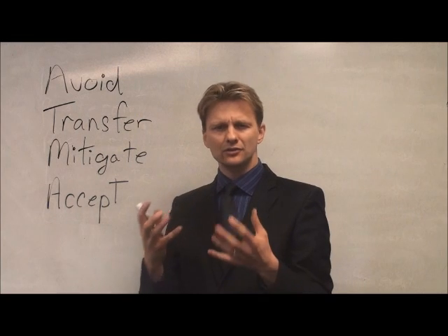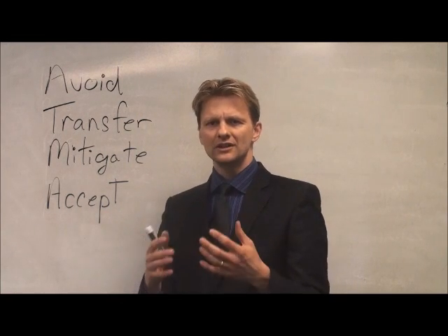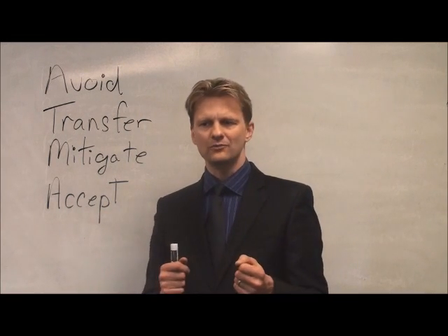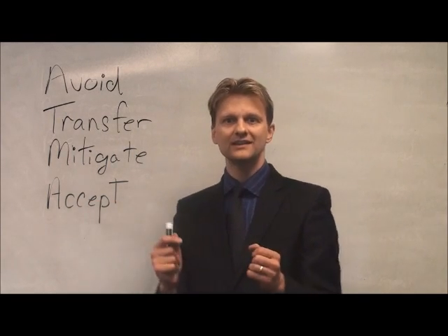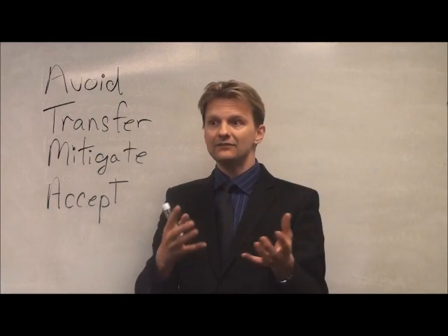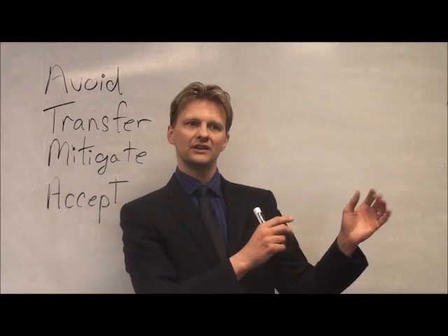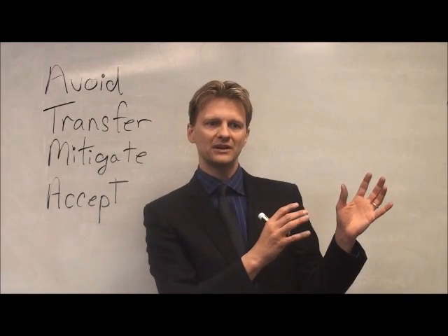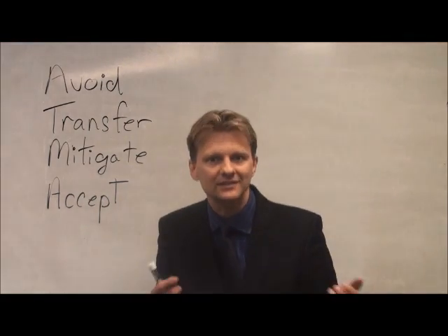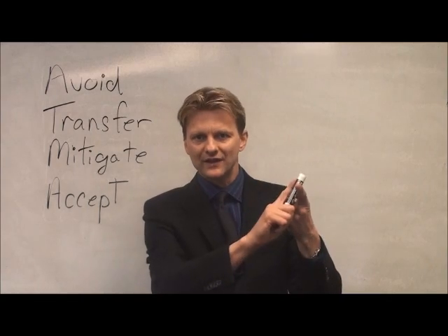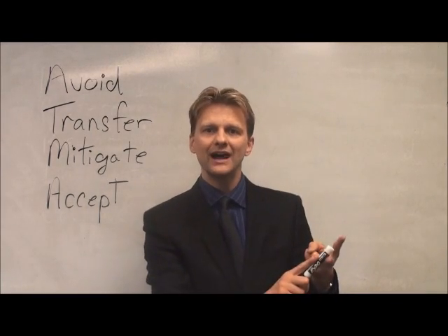And that actually isn't the correct answer that we should say when we identify risk. So there, I just gave a hint, the first thing you do when there's a risk is you identify it. Is it even a risk? Or is it perceived? So maybe people are talking about it, but the perception is more than the reality. So it's not even a risk. So stage 1 is you identify the risk. Stage 2 is you analyze it.